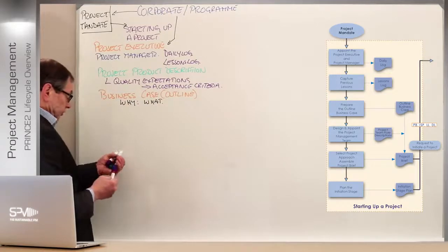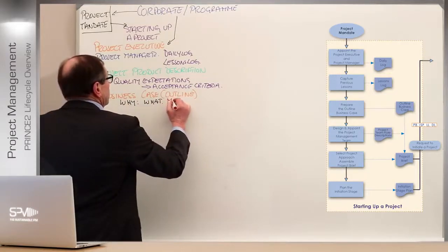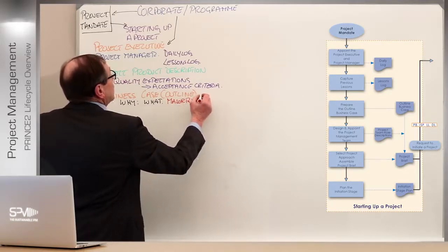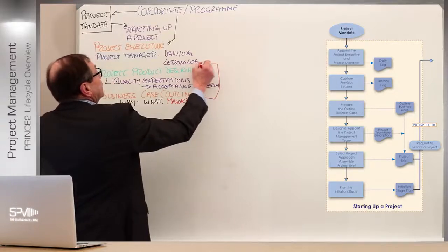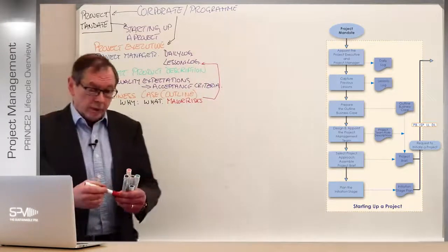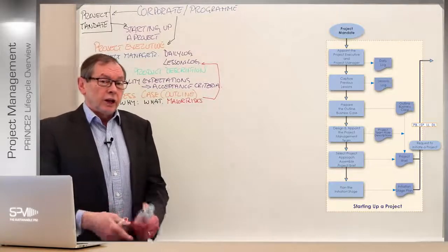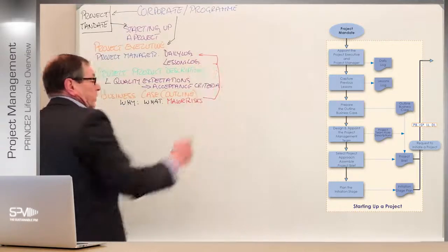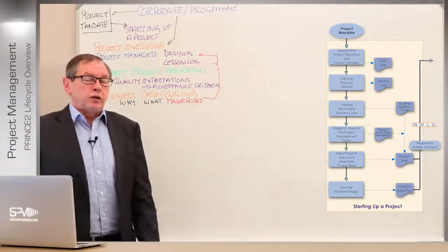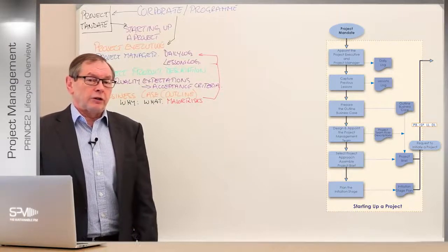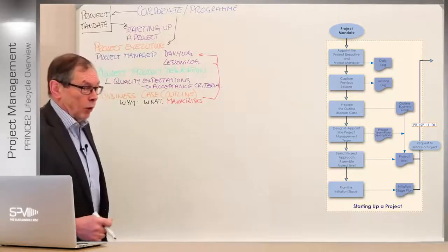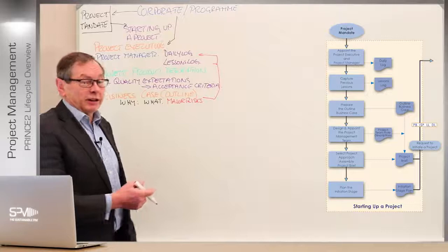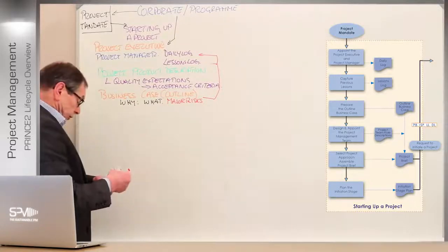I'm going to put major risks in here because they'll have a link. So we also need to make sure we've understood what the major risks are, right? Showstoppers, major risks, because they will eventually also be captured in the lessons log initially, or the daily log, one of them anyway, so that you will transfer that later into the risk register when you formally kick the project off in the next stage, which is initiating the project. Well, almost the next stage and process, because before that we have to go to directing, which you will see in a minute. So the business case.